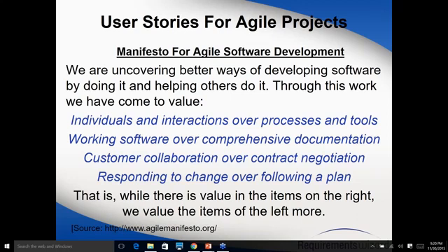So what is the case here is, let's suppose you are the customer and I am the PM of that project, and let's suppose Darshan is a BA. So we started working on it, and finally, after like one month of the requirements phase, Darshan wrote all the documents. He did all the use cases and showed it to Poonam, who happens to be the customer. Now you sign it off, you approve the requirements, and based on that approval, we baseline the documents, and from that point onwards, the design will take place, and then the development will begin.